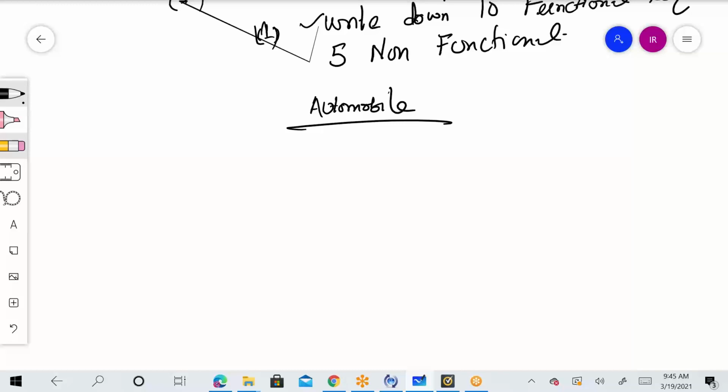But if you're working in an iterative method, it says break down your car, break down your project into multiple small projects, multiple smaller components. For each component, each part, treat it as a separate project and apply all those SDLC steps on that.